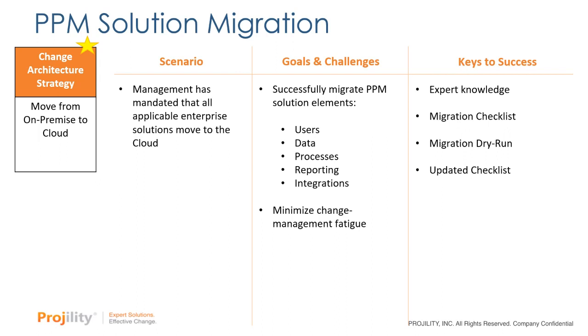If we've determined that it took 16 hours, then that provides us with the insight on when we need to schedule this. Maybe it took 30 hours. Maybe it took 48 hours. So anyway, it will allow you to plan accordingly.